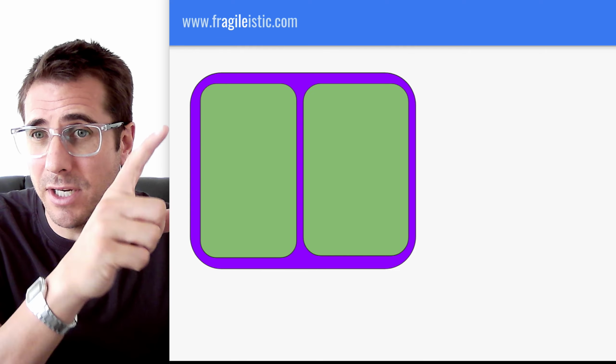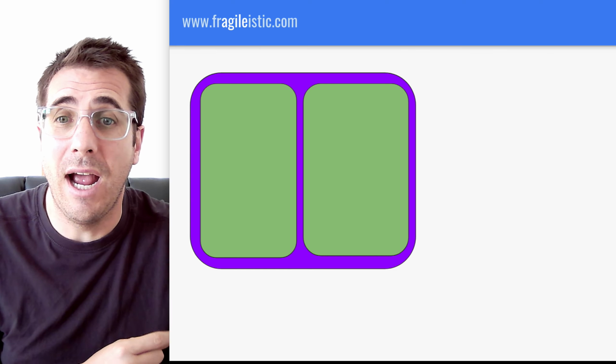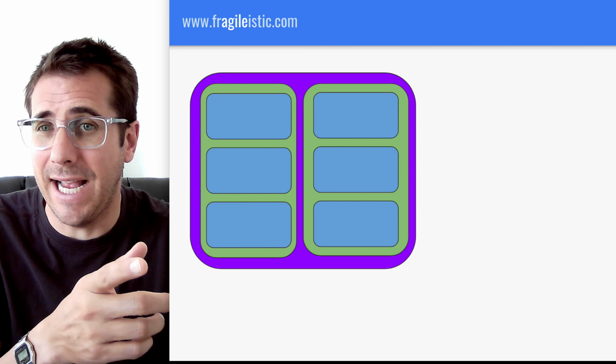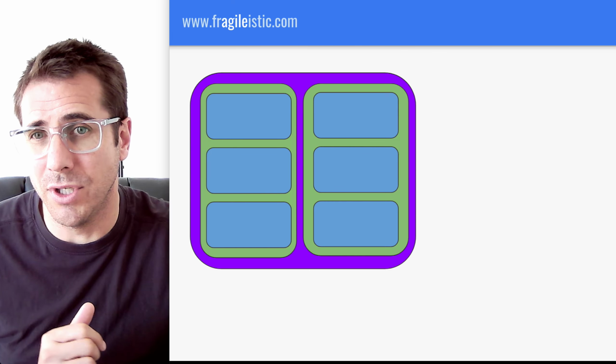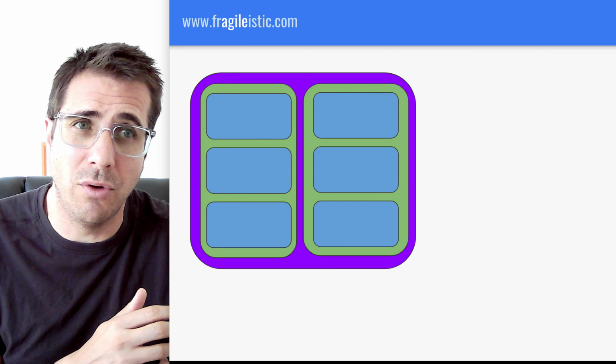Why are we doing it? Well, we're going to deliver this value, and these are the two stories we're going to do in order to deliver the value. And then finally you have some activity, the tasks, that in Jira are blue, in Azure Boards they're yellow. They sit inside there. So that's how we organize our work. That's how we find from the customer value all the way down.